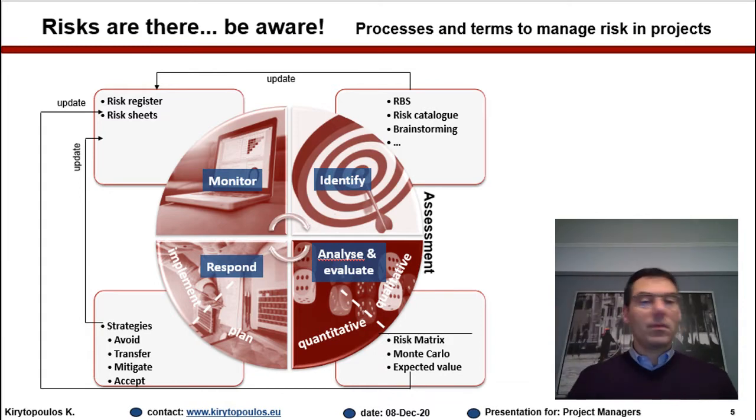And you're going round and round. You identify, analyze, evaluate, respond, and then monitor and control. Monitor and control is practically restarting the circle. You need to make sure that you will have a risk report at every project report that you are doing. That's a very important point.